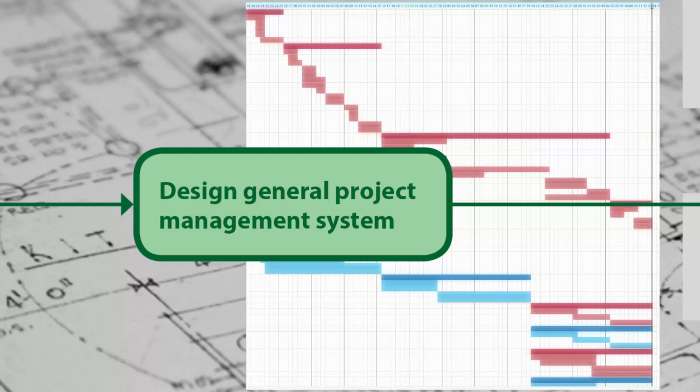And the developer must develop a system or process for overall project management. In relatively small projects, this may be as simple as developing good to-do lists and holding regular team meetings to track progress. But in many cases, more complex project management systems will be necessary. These are often software packages that use Gantt chart approaches, outline the relative timelines between steps and critical path perspectives, and highlight interrelationships between different quasi-independent paths.